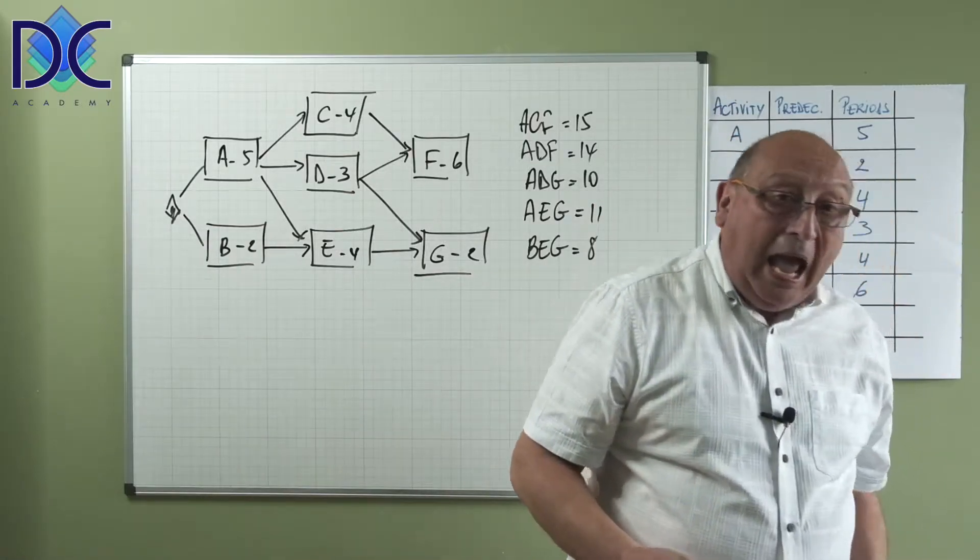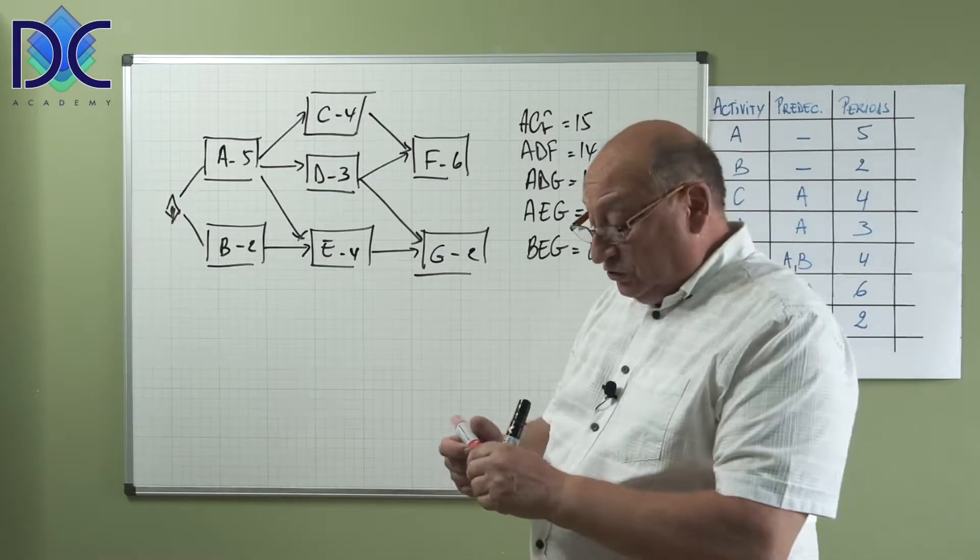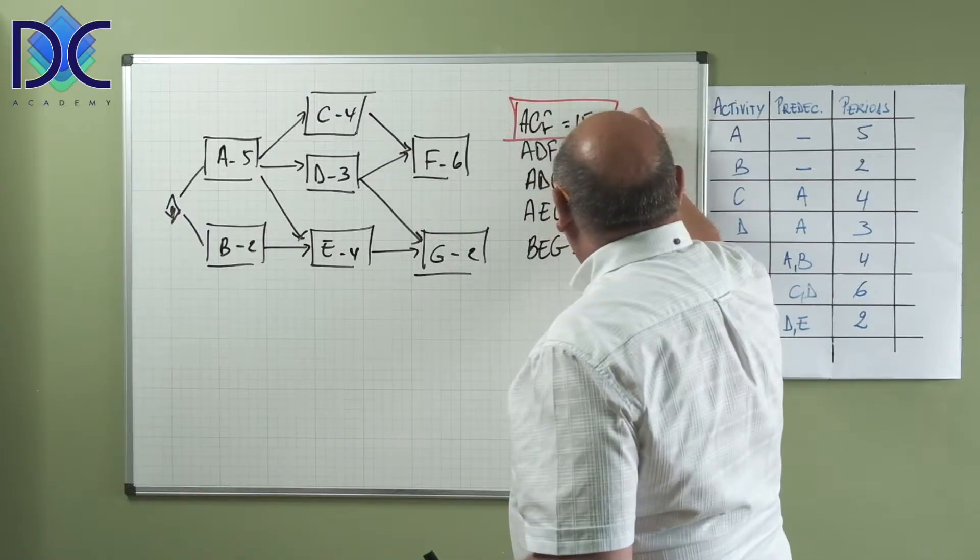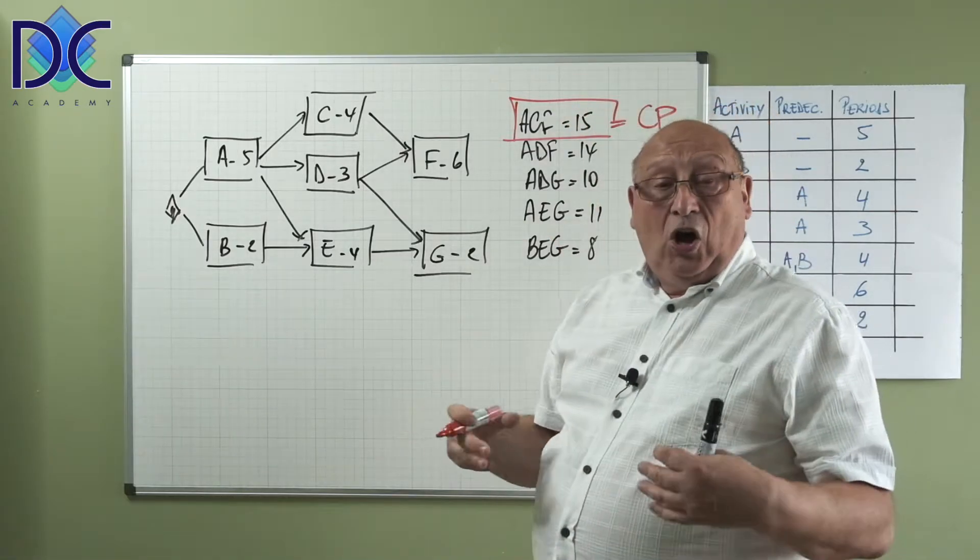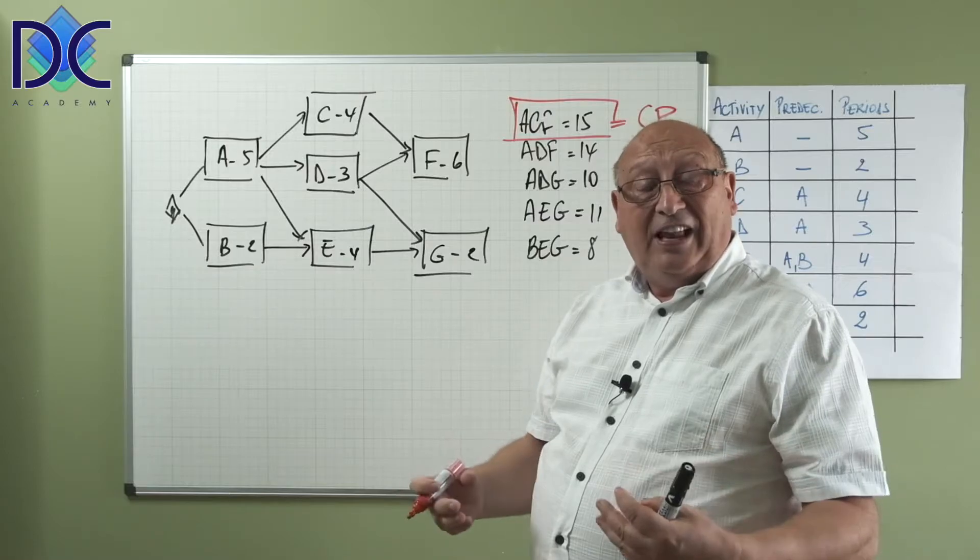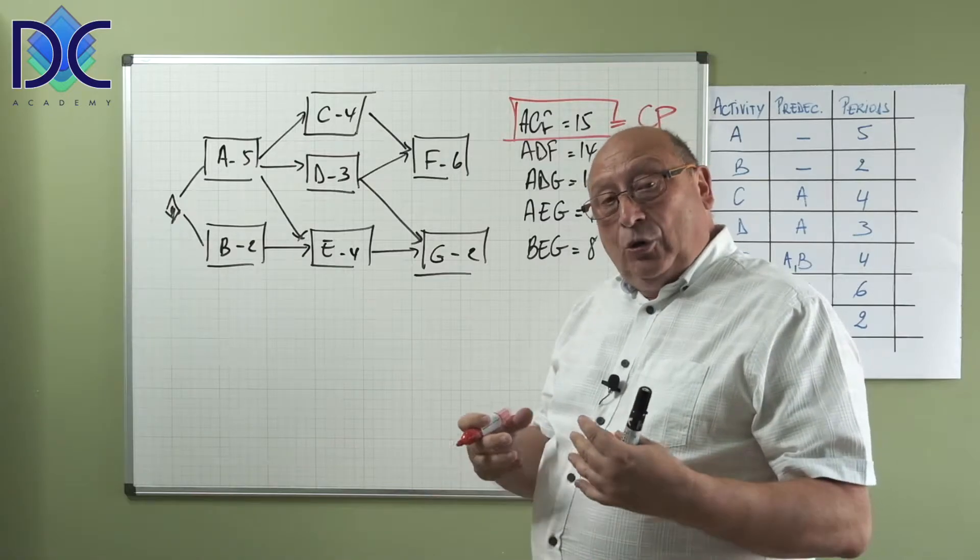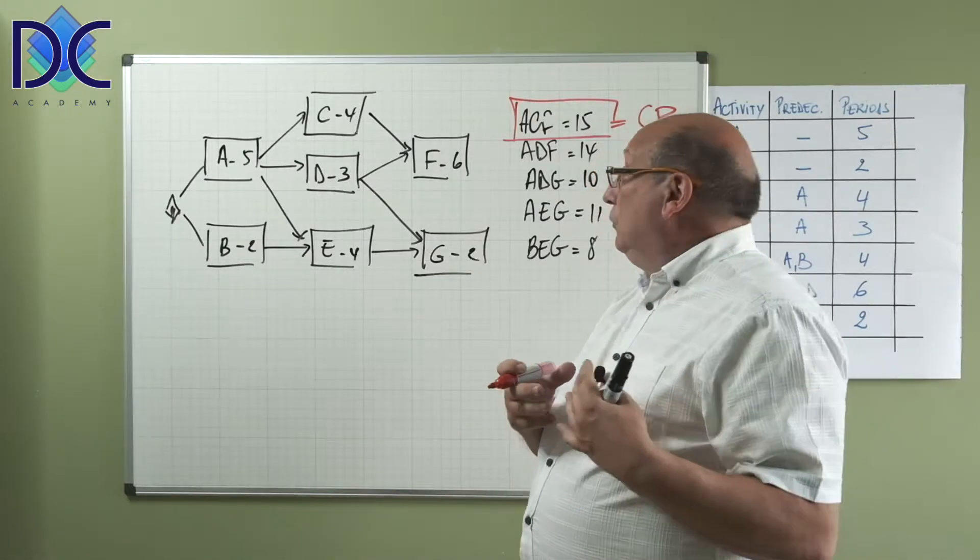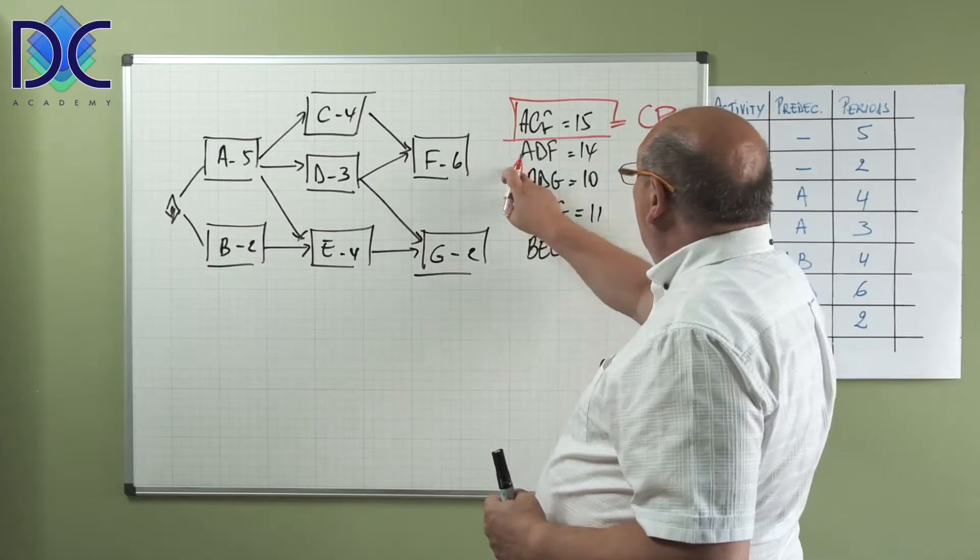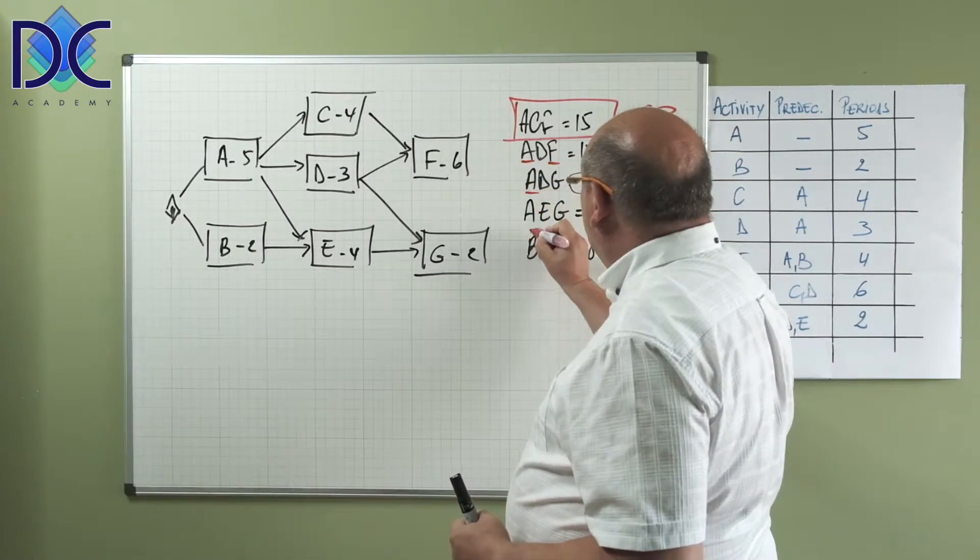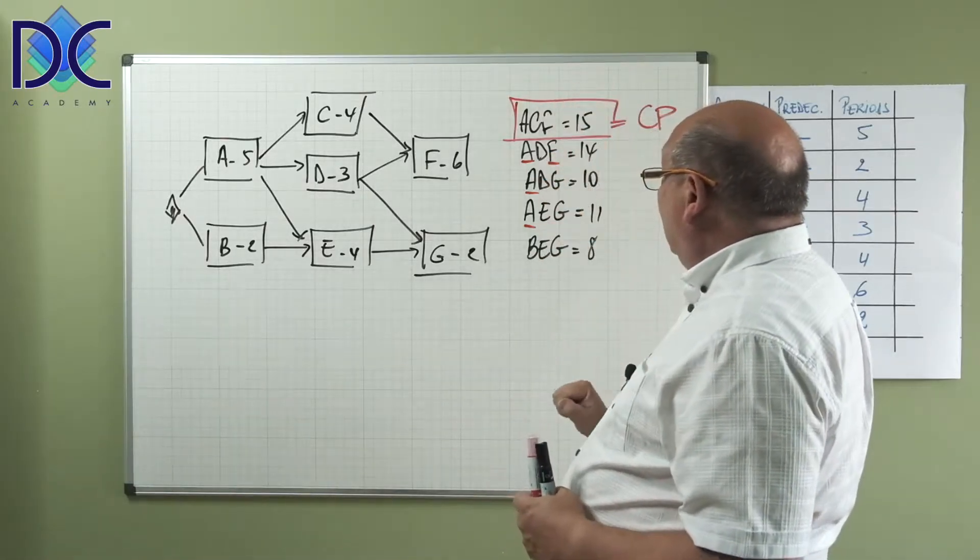The first thing to do is identify the critical path. The critical path is the path which is the longest, so ACF is in fact the CP. A, C, and F are on the critical path, so their slack is basically zero. They don't have any flexibility. When we talk about slack, we talk about flexibility. We cannot move A, C, or F without changing the duration of the project.